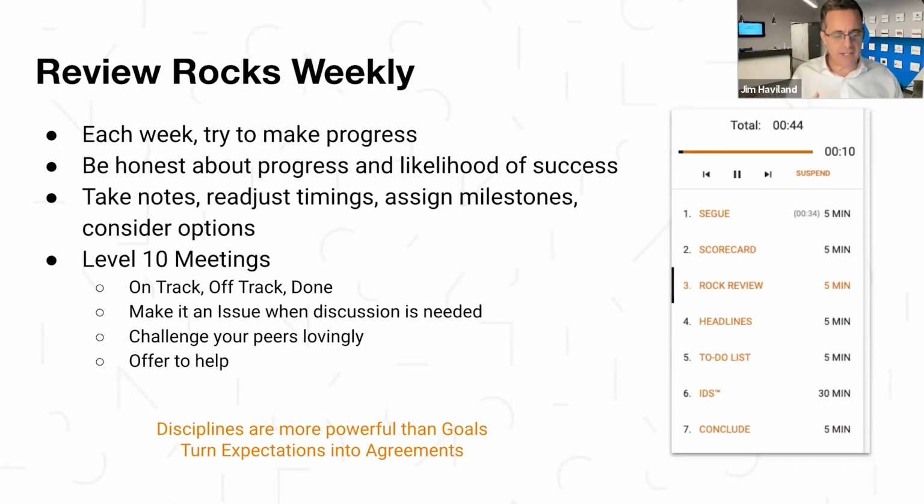And you're trying to set yourself up to make progress every week against these things. That's why we're setting all these milestones in there. But you're going to have to get better and better at being honest about making your progress on your rock. If you haven't touched it, that's not great. So set yourself some time right now before your L10 every week. Put it on your calendar every week as prepare for your L10. That's when you're going to go back and review your rocks, review your to-dos, make sure you're good. Give yourself a day or two before the L10 is my suggestion.